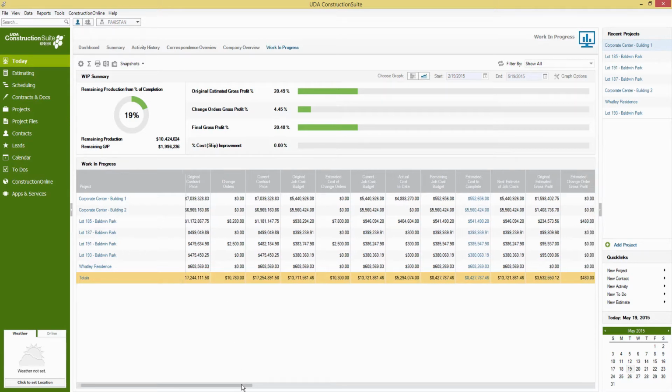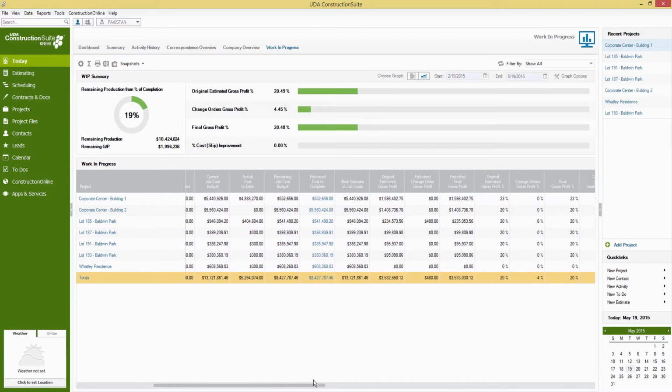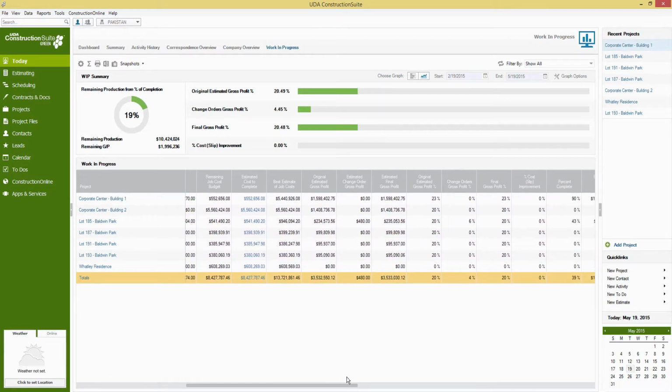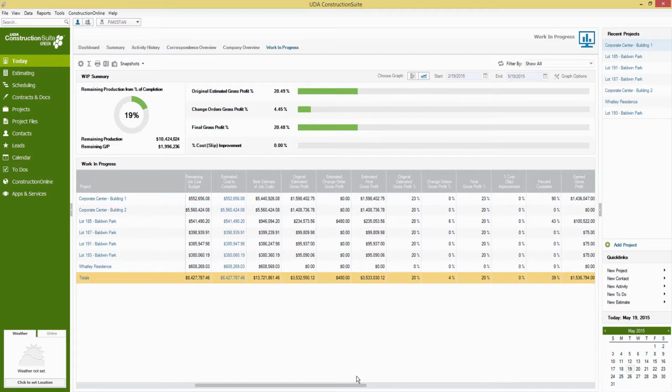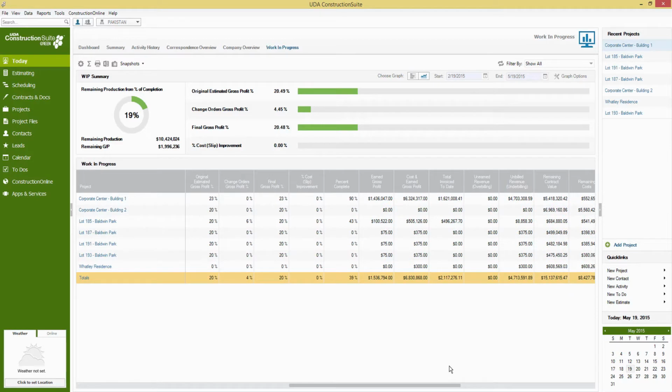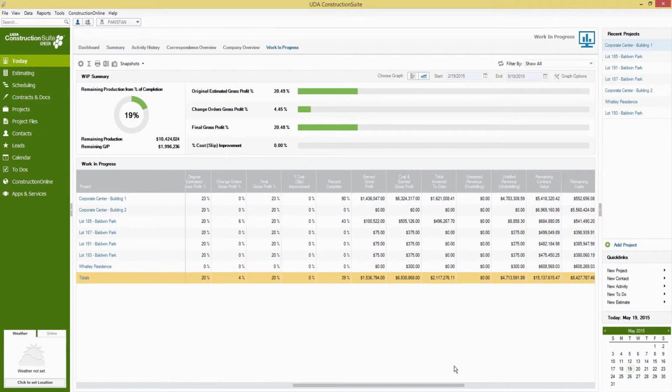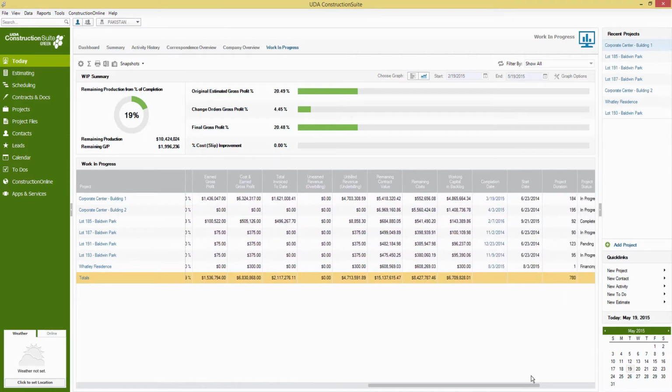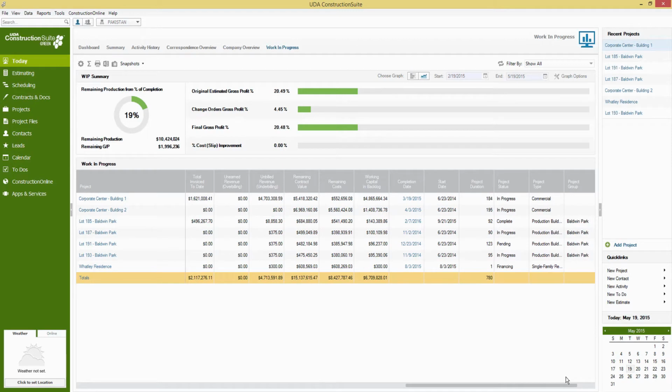You'll also be able to track where you stand on budget with your actual to date, your invoice to date. You'll be able to see the profitability on each job, either percentage or gross profit. You'll even be able to see how well you're estimating using our slippage and grippage tools, which will tell you whether you're typically trending to over or underestimate your jobs. So that's going to quickly allow you to, for whatever date range you would like to generate it for, see really where you need to adjust your process to make your jobs more profitable for your company.